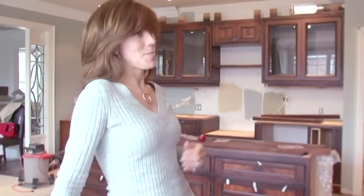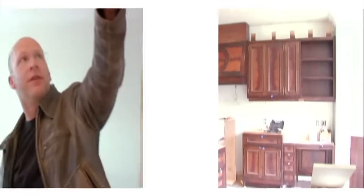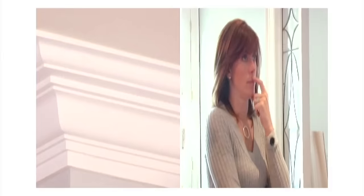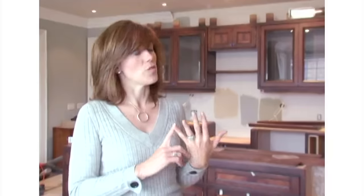I guess what's different about this kitchen for us is that it was an experiment and we'd never done it before. And I'm pretty happy that it's an experiment that's worked out. Of course, the experiment's not quite finished. If we were going to do this right, what would the right order be? The plaster crown moldings were installed first, and that makes it harder to do the mahogany. Wood is far more expensive, and I can't take the chance on something going wrong with the mahogany. But the molding saga isn't over yet.